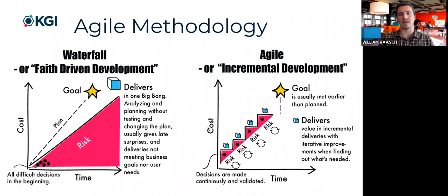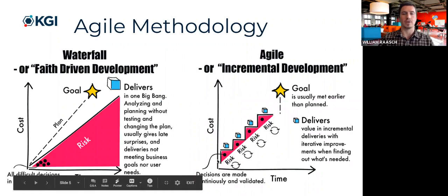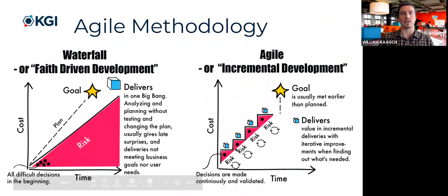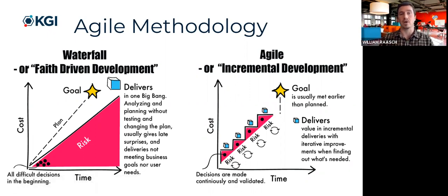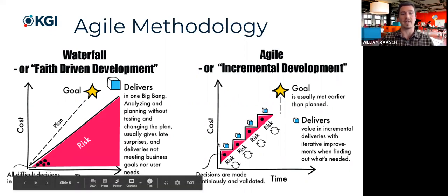Now with Agile, it's much more incremental. So each iteration is its own decision point and it's its own delivery to the customer. So with each iteration, you can roll something out to the customer, which pleases the customer because they like to see new features. They can let you know whether they're positive or not well received. And then that can help you adjust the next decision point.